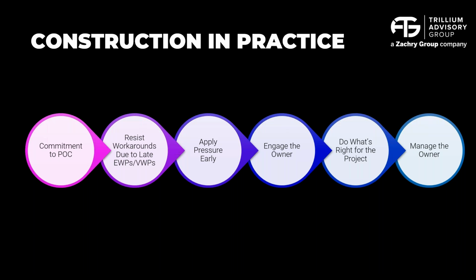Consider that the cost of scaffolding and valve installation after the work has progressed can be 7 times as much as when you're installing from north to south or in line. If you have to come back in and remobilize equipment, remobilize a crane, now do a lot of bull rigging to get a large valve into a tight spot when it was supposed to fit there originally, it's worth that time and effort to spend it early on. Can construction afford to spend this? Can the project afford to do this?